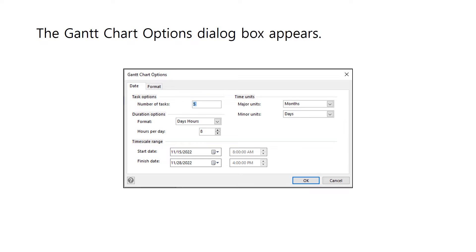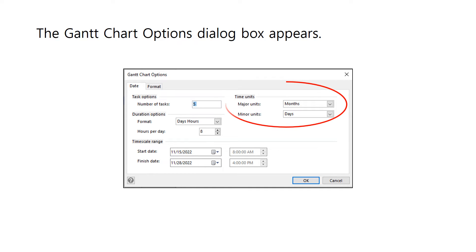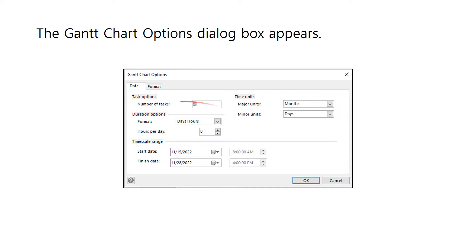After clicking the Create button, the Gantt chart options dialog box appears where we can specify the basic details of our Gantt chart. The number of tasks can be specified under the task options. By default there are five tasks, but you can change it to correspond to the number of tasks identified in your work breakdown structure. On the right side, the time units can be specified. The major units indicate the largest timeframe, while the minor units indicate the smallest timeframe for working on the project. Below the task options, the format for the task duration can be specified, as well as the number of hours per day required to work on the project.